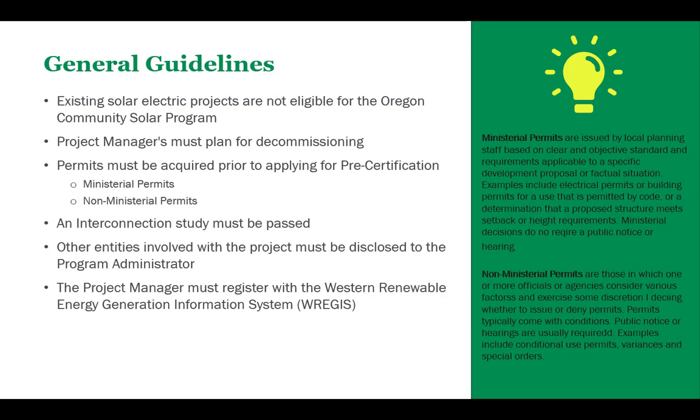Renewable Energy Certificates, or RECs, are the accepted legal instrument through which renewable energy generation and use claims are substantiated in the U.S. renewable energy market. If the community solar project is greater than 360 kilowatts in aggregate size, you must register with the Western Renewable Energy Generation Information System to report any REC sales and report annually. If a project is less than or equal to 360 kilowatts, you may request a waiver from registering with the WREGIS when applying for pre-certification.